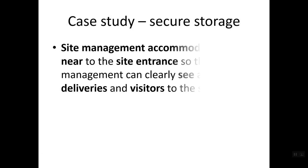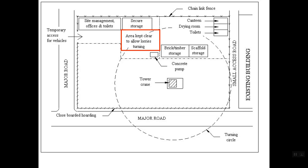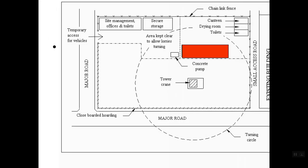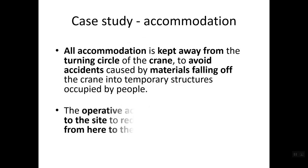Accommodation is clearly marked in the case study. An area is kept for vehicle turning for lorries and containers. There is a designated place for the concrete pump because when concreting upper floors you need to pump concrete through tubes rather than directly from the concrete truck, so a specific location must be allocated for the concrete pump and for concrete testing.